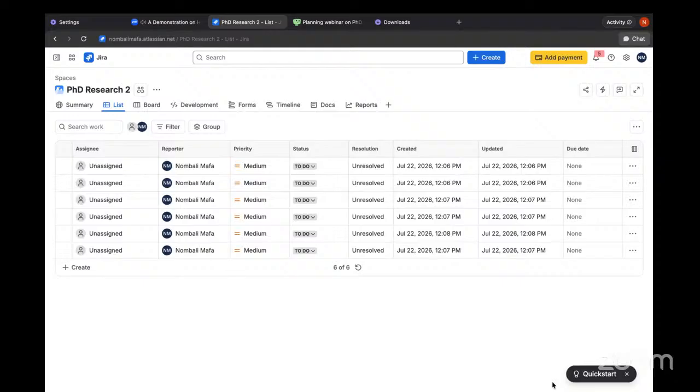So over here, now we're going to build milestones related to different epics, right? So a submission date becomes less intimidating when you work backwards, for example. So you'll start with a fixed milestone, then identify major outputs that must happen before it. So I'll make an example related to a task. So I'm going to just do this.